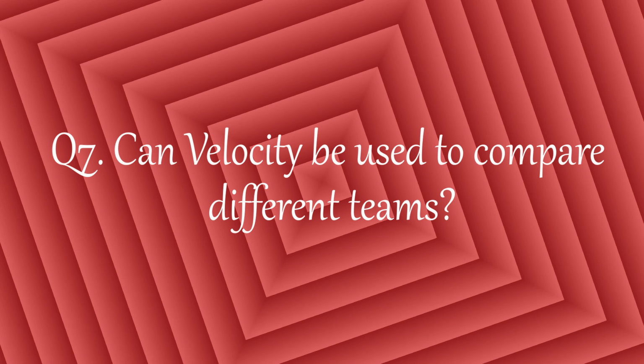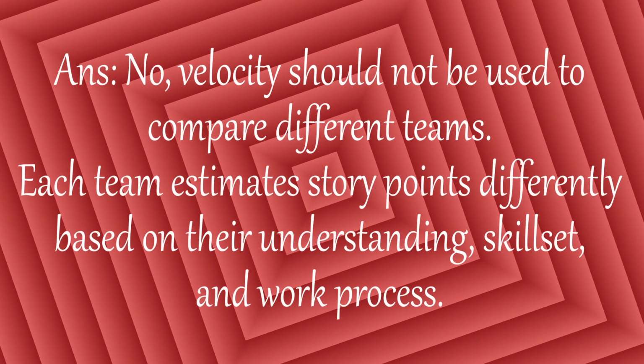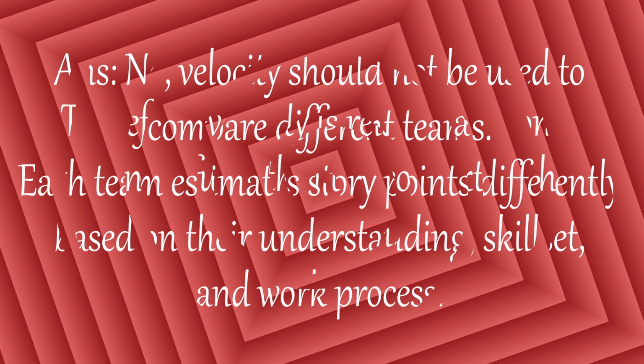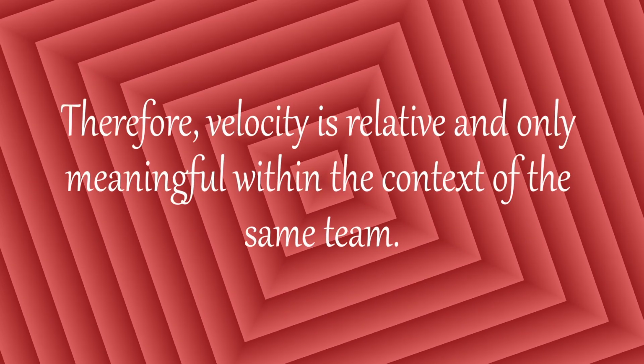Q7. Can velocity be used to compare different teams? Answer. No. Velocity shouldn't be used to compare different teams. Each team estimates story points differently based on their understanding, skill set, and work process. Therefore, velocity is relative and only meaningful within the context of the same team.